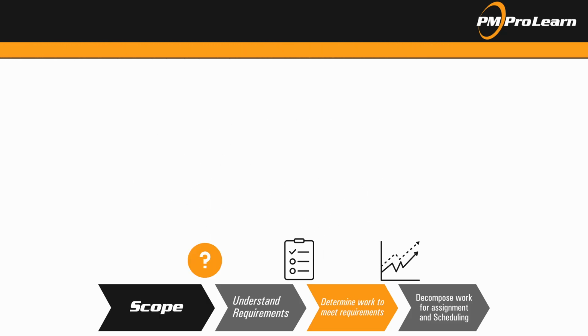A common question we've heard in our classes: how can we plan scope management before defining the baseline? Shouldn't we know what we're doing before trying to make a plan to manage it? Well, the answer is that the high-level scope is already given. Which document is that? That's right, it's the project charter.